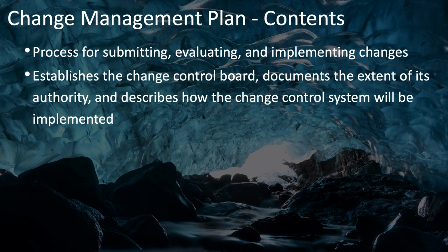It should also specify how to implement changes. Who's going to be responsible? How will these changes be handled as far as oversight and reporting and recording of what happened and review of what was done? How will changes be checked and verified and reviewed later to see if the expected benefits of the change have been realized?